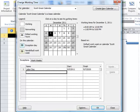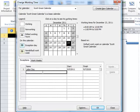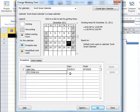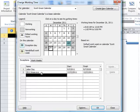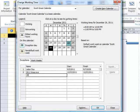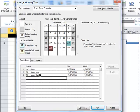Okay, what we'll typically do is we're going to exempt the 23rd. So I'm going to put 2011, Xmas Eve. And so that's going to be an exception. I'm also going to put in Christmas Day as an exception.